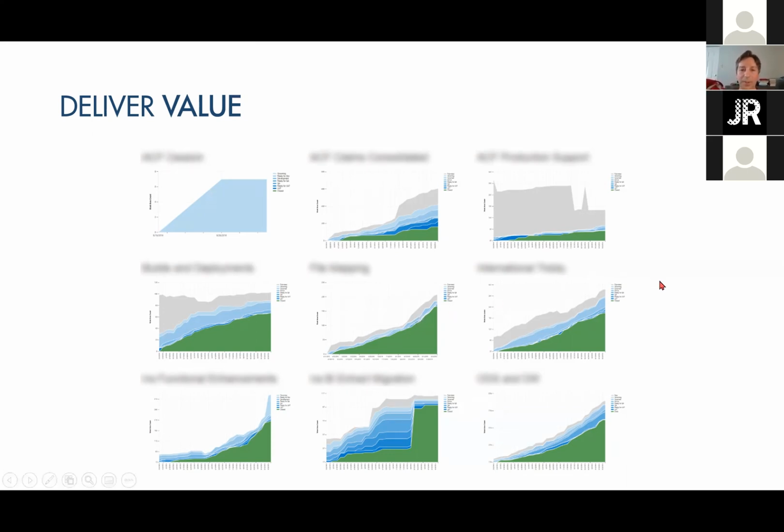The interesting thing about these is most healthy teams all tend to be healthy in a very similar way. So number 5 here, number 6, 7, and 9 all have a very, very consistent and similar trend. They tend to be highly collaborative. And if you notice, they get better and faster as time goes on. The angle of this line is the velocity that team is producing value.